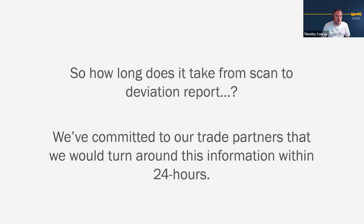The contractors do have the ability to say, we feel that we are correct, so we're going to proceed at risk and bury the system. We do say, though, if it's being buried by concrete, you must wait for us to let you know whether or not we saw any concerning deviations. The goal in all of this, and the real push behind the 24-hour turnaround, goes back to that statement I made earlier about how we decrease the number of decisions made where the person making the decision feels like they don't have a complete picture of the situation. This is just one more lens that we're looking at those problems from to try to have a better outcome.